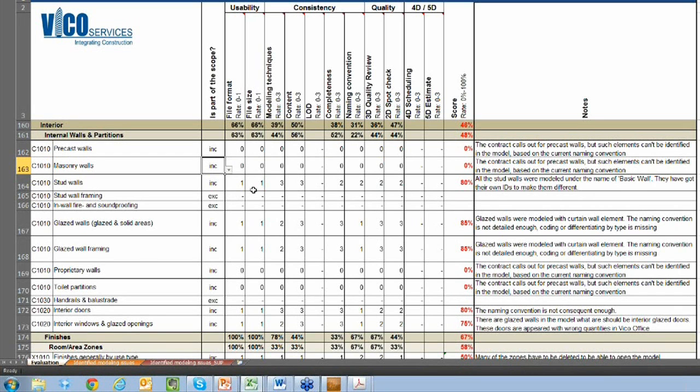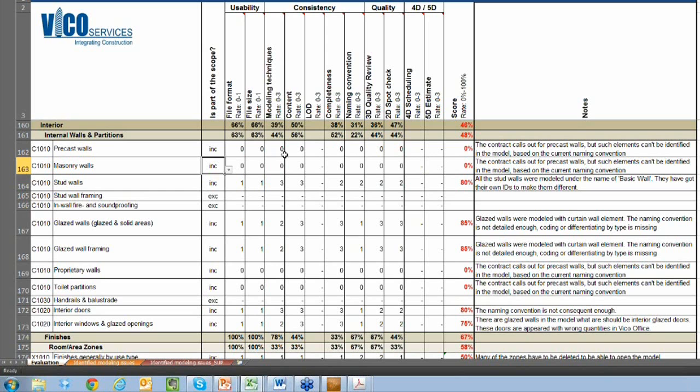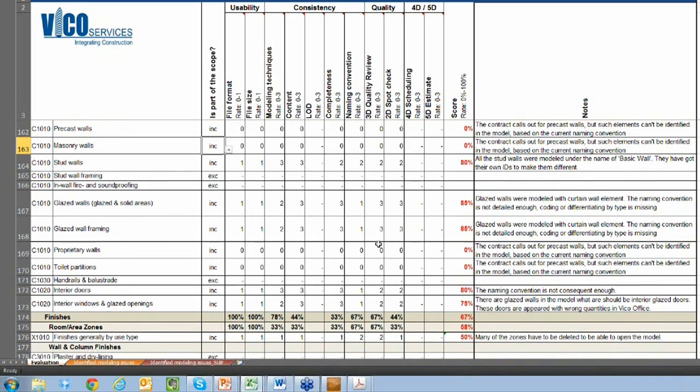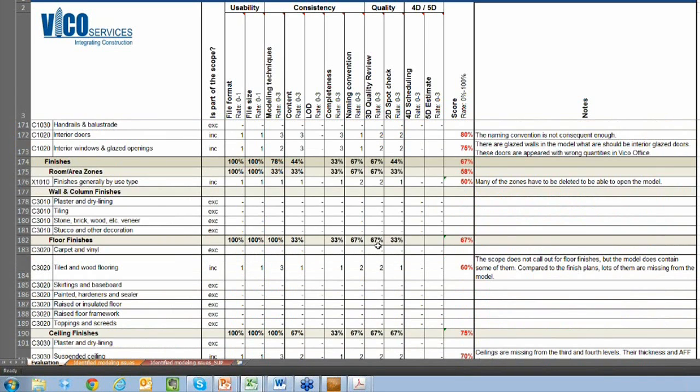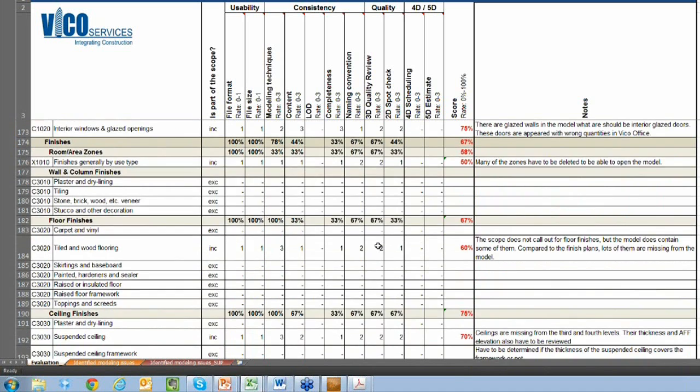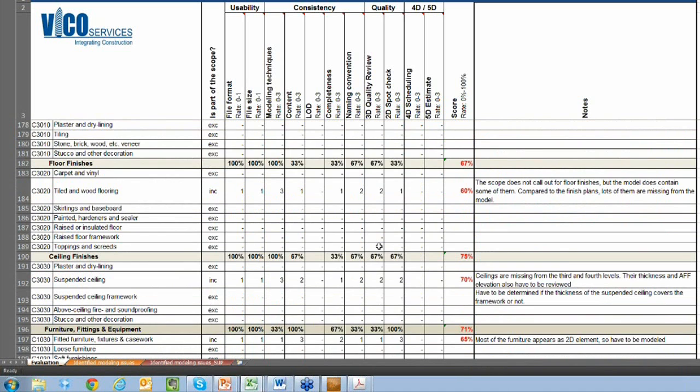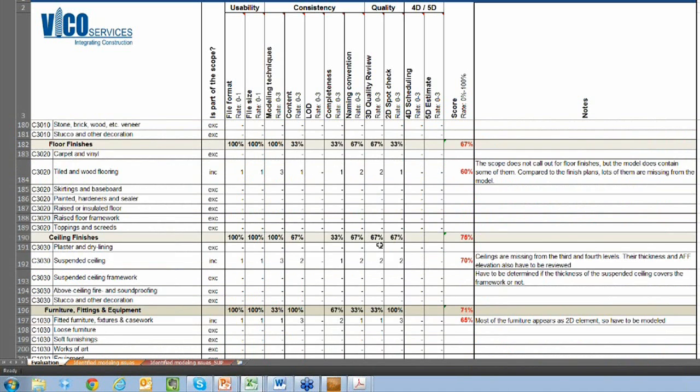We go through and we manually evaluate these things in the model. We actually open them up and have a person that works line by line to see what's included and then rank the model based on this information. And you can see that the output of that is a score. Using this percentage over here, we can start to get a feel for the quality of the design model, to make sure that it's good for a coordination background. We can also identify some of the things that may need to be fixed up before we proceed with coordination.